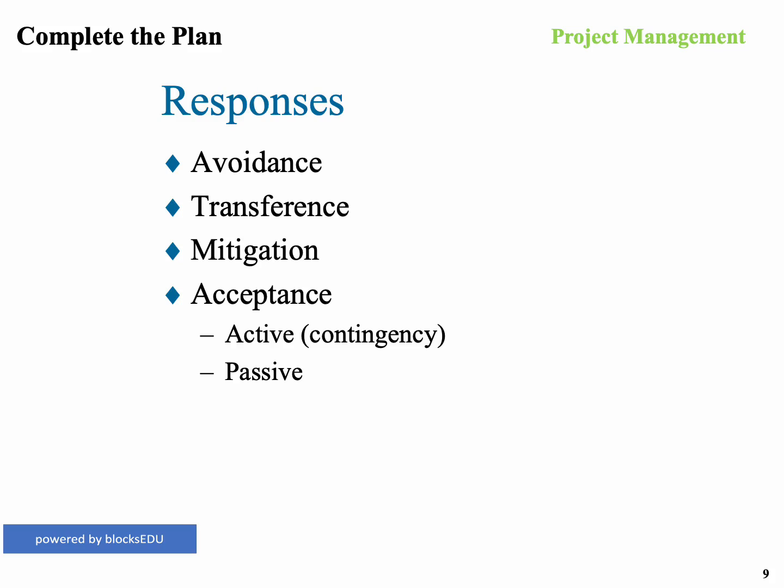An example of this: if you have something that requires specialized knowledge, but you don't actually have those skills in your area, you may hire a contractor to do that. And so therefore it's up to them to ensure that that task gets done correctly. Now, just remember one important thing. Even though you transferred the risk over to the contractor, you're still responsible to make sure the contractor performs as per the contract.